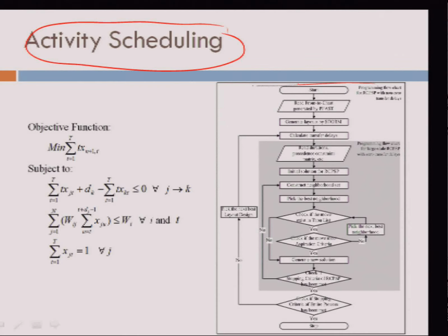So this is the Tabu search algorithm that we've coded. All that we're doing is solving an operations research problem called the resource constrained project scheduling problem. Why? Because there is a resource constraint: you have only so many people available at certain times. And why precedence constraint? Because when you do work, certain activities have to be done before other activities can be done. As in a project where two or more activities may need to be done before something can start, similarly in setup, certain activities may need to be done together before something can proceed.